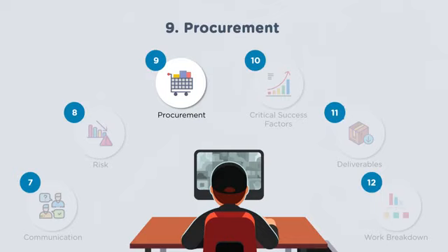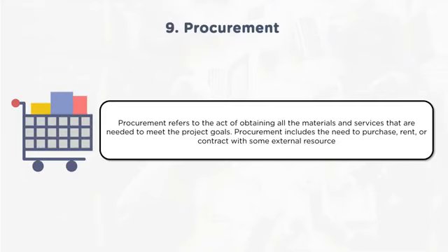To purchase, that has to happen from a specific supplier. You cannot go with every supplier. You should evaluate the suppliers, qualify the suppliers, and then select and onboard the supplier, and then get the services or products supplied by that particular supplier.